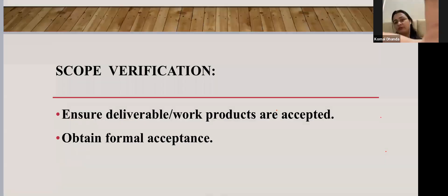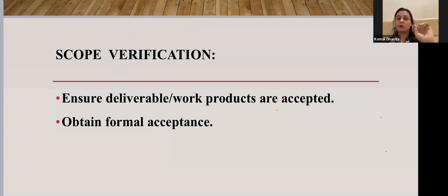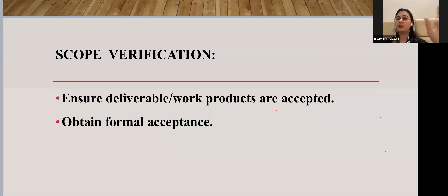Scope verification is not about verifying what we are delivering against the scope — that is part of scope control. Scope verification is about ensuring that the deliverables or outcomes coming out of the project satisfy the scope so that final acceptance will be approved. Whatever outcome comes out must be accepted and approved at the end, otherwise all project efforts — whether one year or two years — will go in vain.